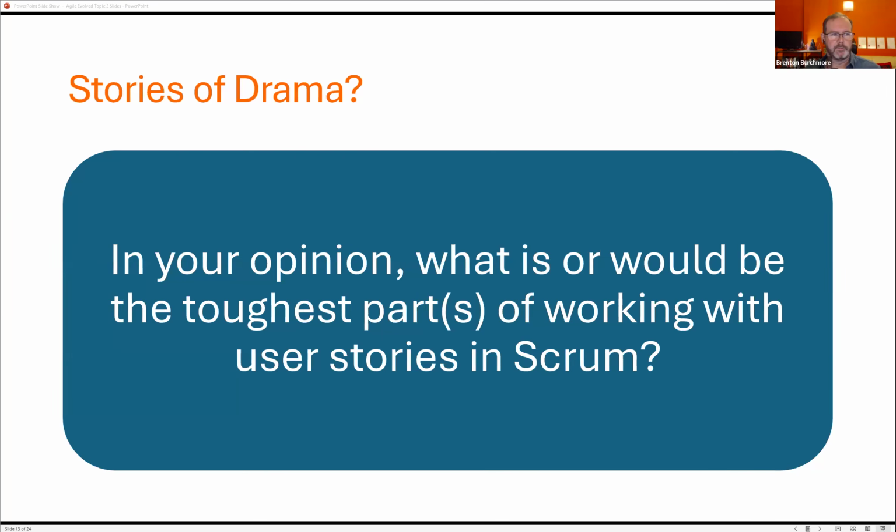Wow. Okay. That's complicated. It does seem to me, I'm rereading it just to put it all back in my head. So the team, I'm assuming they mean the development team, don't know the tasks that are required until during the sprint. That would suggest there's a problem with estimating. That would also suggest there's been a weakness in the refinement process of understanding the user stories, where they may not have done enough to fully know enough to measure and estimate how many story points a story is going to take.